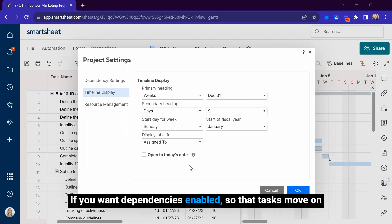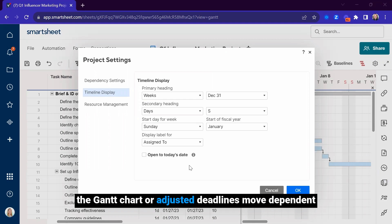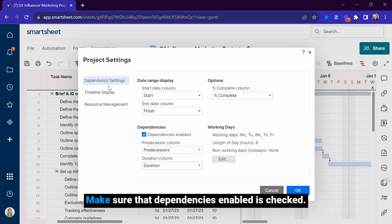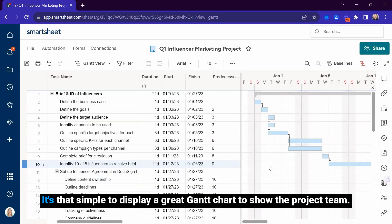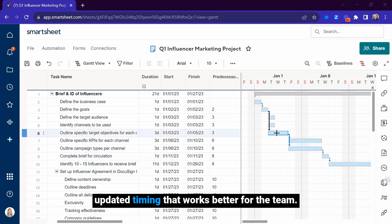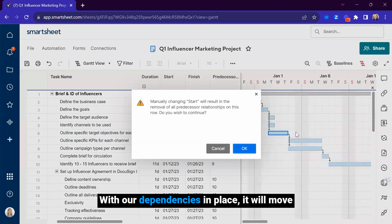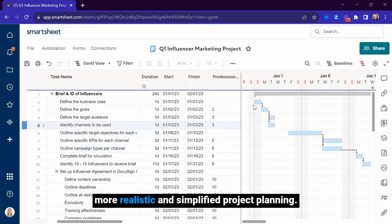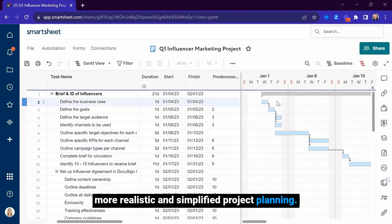If you want dependencies enabled so that tasks move on the Gantt chart, or adjusted deadlines move dependent tasks outward, click on the dependency settings and make sure that dependencies enabled is checked. It's that simple to display a great Gantt chart to show the project team. Using this view, we can move around tasks to reflect updated timing. With our dependencies in place, it will move out tasks that are dependent on one another for more realistic and simplified project planning.